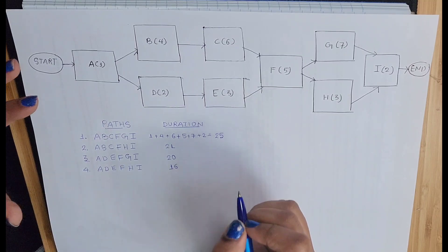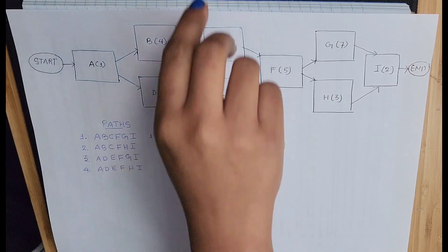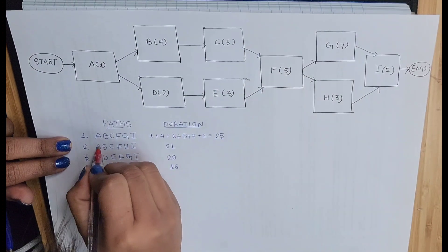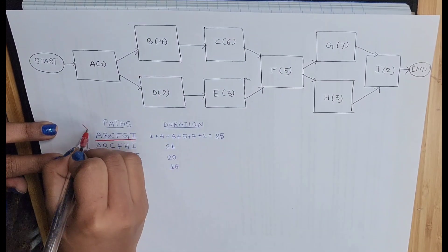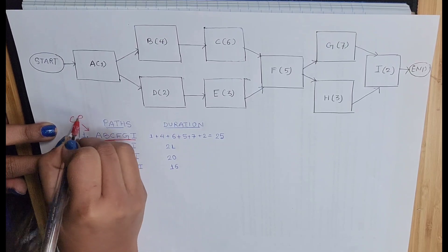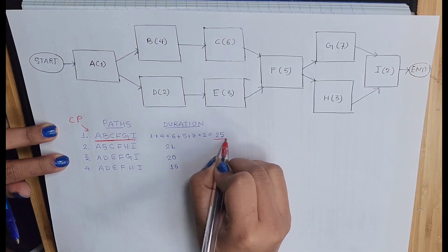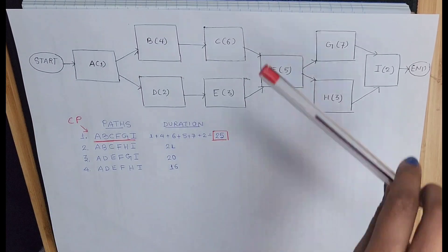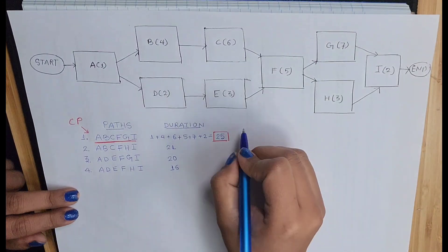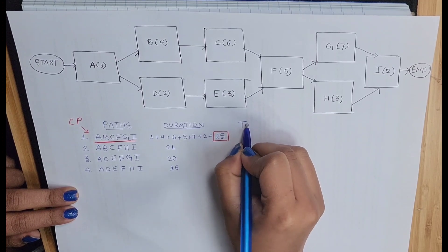Now you know that the longest duration is our critical path. So now you know that A-B-C-F-G-I is your critical path because it has the longest duration as 25.